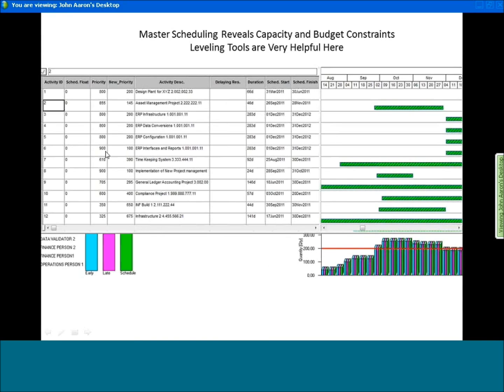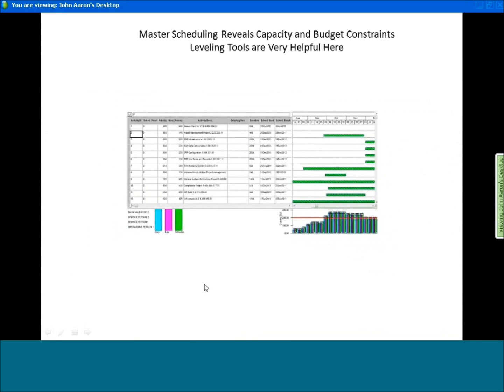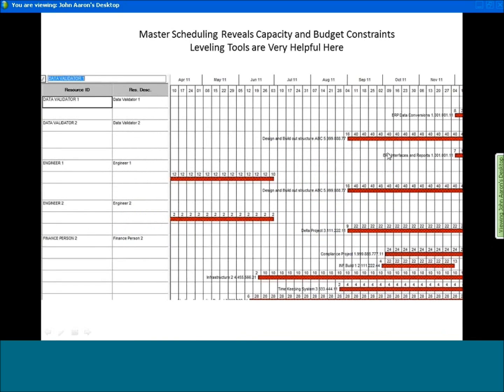Now, if I use my priorities in this case, I can see that regardless of what the customers want, it could be that I don't have the capacity to handle all these, right? Each of these are resources that would be assigned, and this is a view that shows the demand of resources for these various projects, which causes the overload.